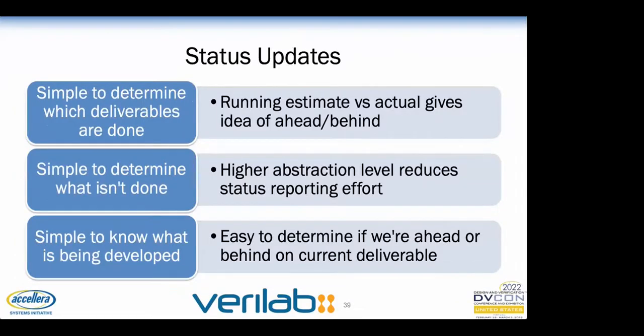By sticking to working on a single deliverable at one time and completely finishing it before we move on to the next, our status reporting becomes very low effort and clear to the whole team. A quick comparison of what is done versus where the team thought they'd be tells the project manager whether we're on track or not, and even better, how far ahead or behind we might be.